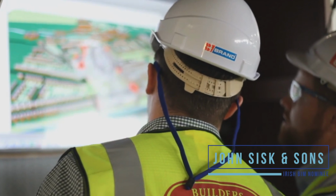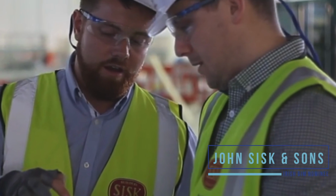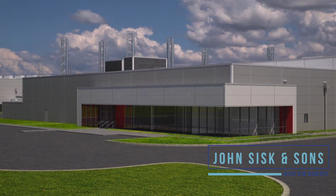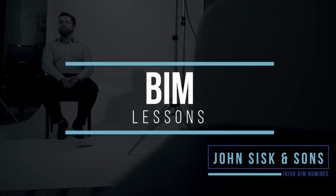Part of that was to ensure that we had everyone working in a collaborative BIM environment. So we carried out a one-week training course where we ensured that we had a train-the-trainer process put in place, that all project management would have the skills to train all of their trades and all of their staff. So we had everyone on the project team working in a collaborative BIM environment. Developing an open and honest relationship with our supply chain and having trust across the whole project team.